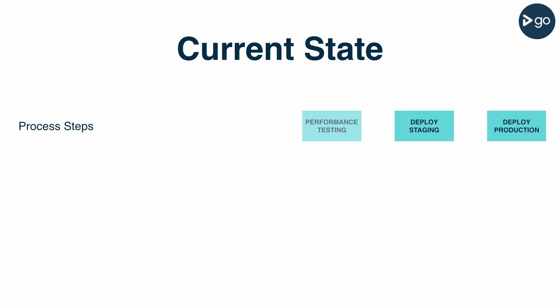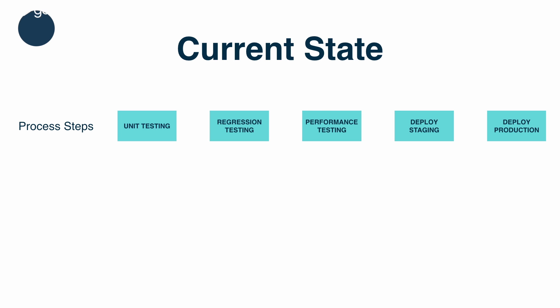Most people start from the end when creating a value stream map and work backwards. There are many reasons for this, not the least of which is to avoid muscle memory of what you think should happen as opposed to what does. The next thing we need to do is take down how long each of these steps takes.